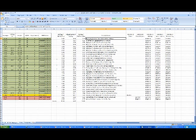So we computed the durations. We created new activity names to improve on our old ones that were the concatenation of the street name and the from and to intersections. That's really helpful inside P6. So you're looking at Highgate, you know what the limits are, instead of looking at a whole bunch of Highgates and not really understanding what the cross streets are.